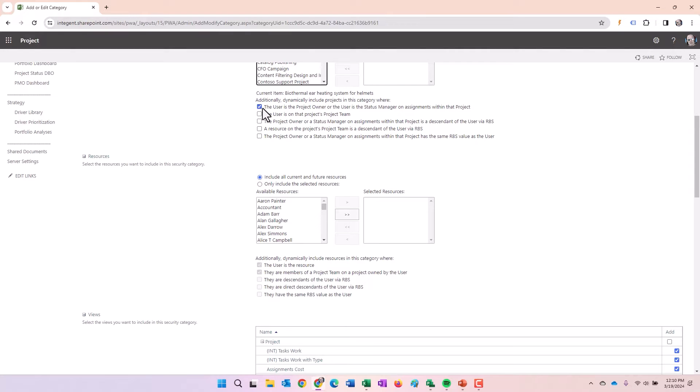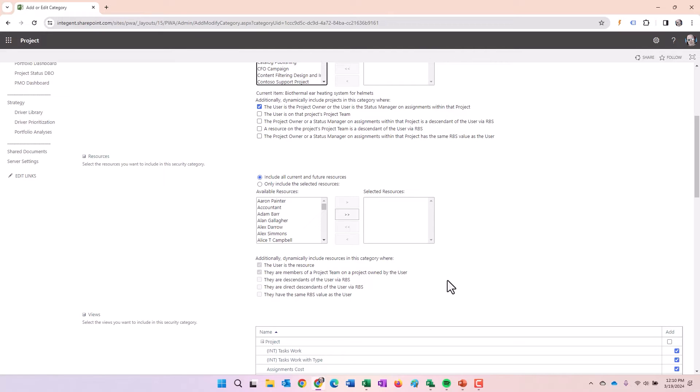The current checkbox here says if the user is assigned this category and they're the project owner or the status manager on assignments in the project, they'll get to see the project.